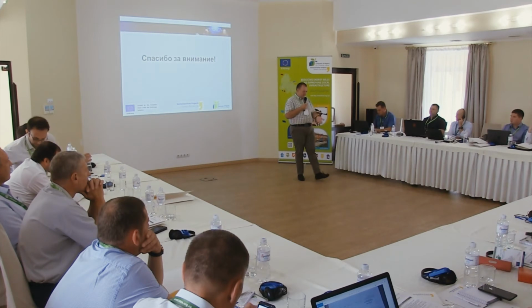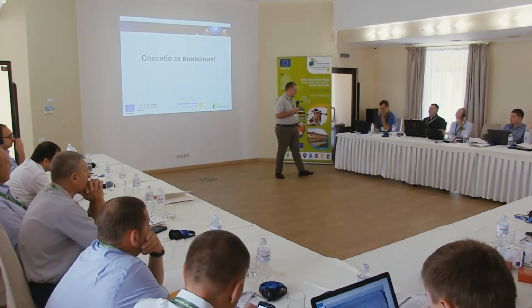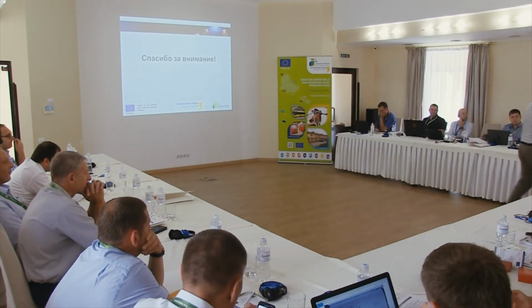And further on, when we try to disseminate the lessons learned and the experience of the demonstration projects, we would be willing to tell the cities and towns that, come on, if your street lighting system is in a bad condition, you will get plus 50% of consumption. For example, the project in Mena got this effect. The estimated saving was 66% from the baseline, but de facto we got plus 50% of the consumption of energy and therefore of the money for its payment. And we spent the whole budget for lighting within 2 months.